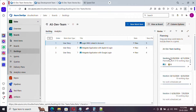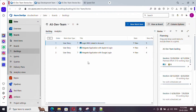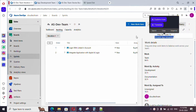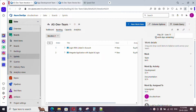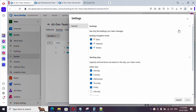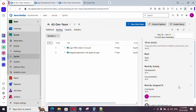As of now we've planned using story points and assigned user stories to this iteration. Now let's jump to the sprint boards. We are in dev team backlog and you can see 10 working days remaining in the sprint. Even though we added 14 days, it's showing 10 working days because holidays are excluded. If you click on configure team settings, you'll see working days are set to Monday, Tuesday, Wednesday, and Thursday, which is why it calculates and shows 10 working days.